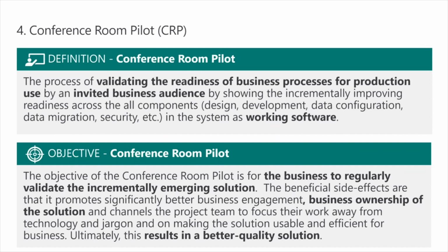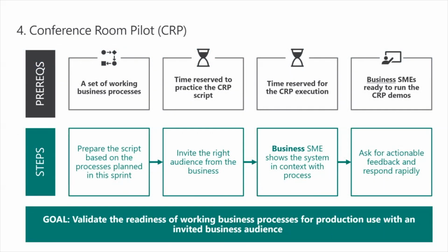And the recommendation is that you have this defined and delivered by the business SMEs that are on the project. So this show and tell, this conference room pilot, is not being shown by the functional lead from the implementation partner. It is actually being shown in working software by the business SME. And that gives a huge amount of credibility to the business audience when they can see one of their own from within their organization talking to them about how this process will work for them in the system.